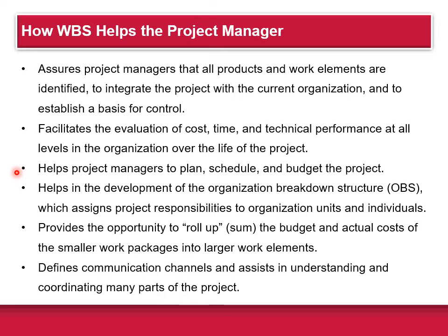budget the project. It also helps in the development of what's known as the organizational breakdown structure, OBS. This assigns project responsibilities to organization units and individuals. We'll talk more about this in a couple slides. The work breakdown structure also provides the opportunity to sum, or what's called roll up, the budget and actual cost of the smaller work packages into larger work elements. It also helps to define the communication channels and assist in understanding and coordinating many parts of the project. We'll talk later in the lecture too about setting up the communication channels.